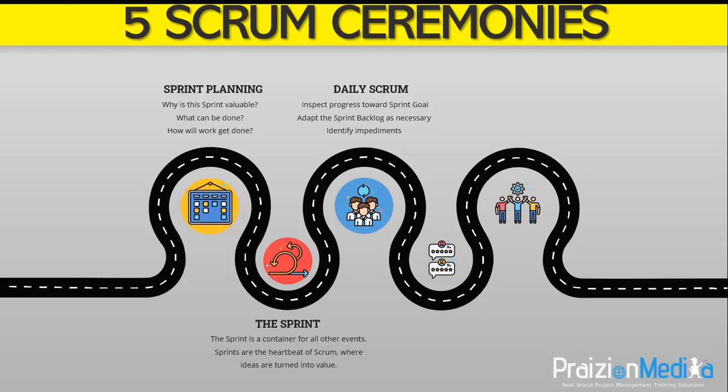The daily scrum is not the only time developers are allowed to adjust their plan. They often meet throughout the day for more detailed discussions about adapting or replanning the rest of the sprint's work. Now, do recall, we don't want an anti-pattern of giving status in the daily scrum. Instead, we want to take any sidebar conversations that need to happen outside of the scrum. If impediments are realized, the follow-on discussions take place outside. If the team needs to meet in pods, they can do that outside of the daily scrum. Let's talk about the next one.